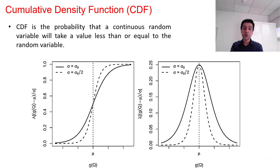Cumulative density function for continuous random variables can also be plotted. And that's the S curve, which is often the terminology used in industry. A very interesting observation is that when the standard deviation is reduced, we have less spread in our data. If you look at the PDF on the right-hand side, and for the dotted graph, we have a smaller standard deviation. So it is having thinner tails and more contained distribution. Same concept with the S curve or CDF on the left-hand side. And the distribution associated with lower standard deviation, which is in dotted lines, is more upright.